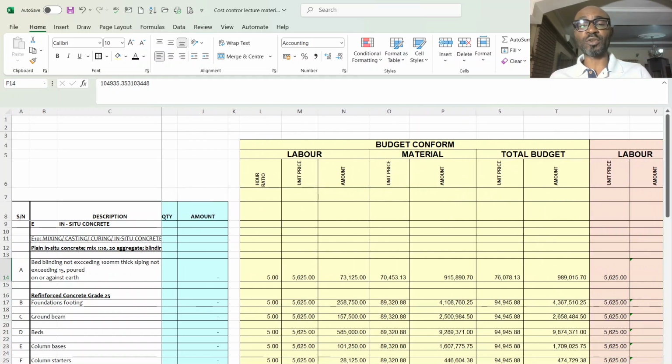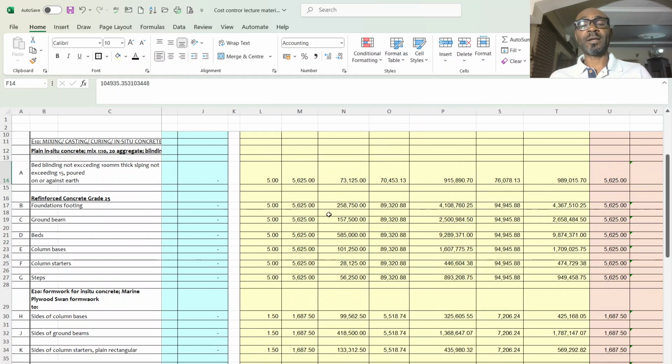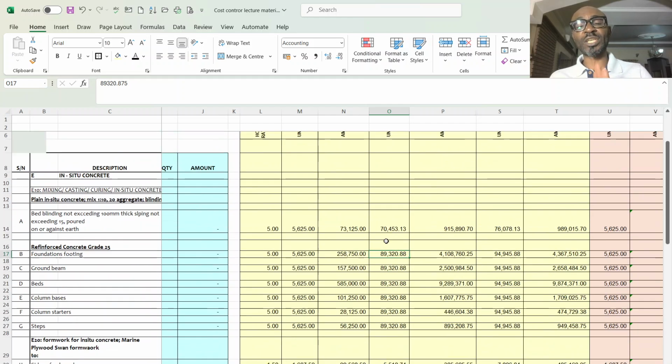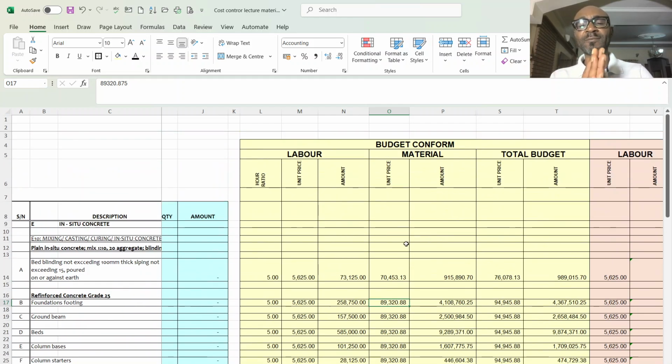After securing the job, I had to cut the links of these unit rates that were linked to my rate build-up so that this unit rate will not change, because it is my budget to which I'll be referencing all my activity on site.